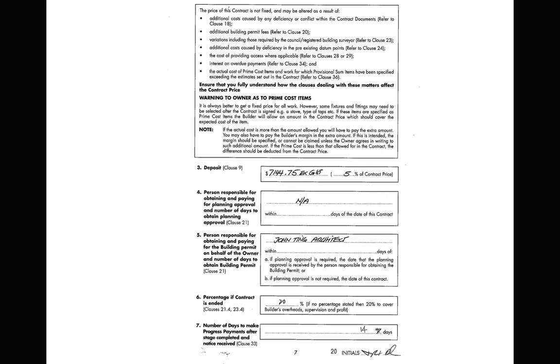And so how that works is that essentially once the building permit has been issued, the building approval has been issued, the client and the builder then agree as to what day the builder is going to take possession of the site from the client, and then that day is recorded formally but elsewhere, not in the contract. Also in there is the price including GST, which you can see down the bottom, and also what the amount of the deposit was, and the penalties and so on and so forth.